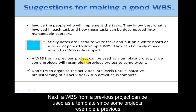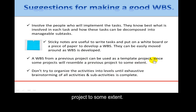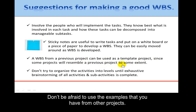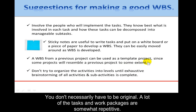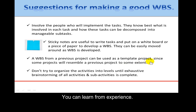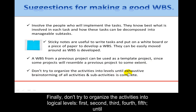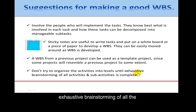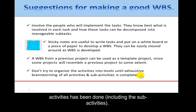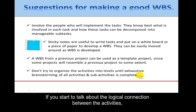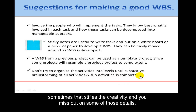A WBS from a previous project can be used as a template, since some projects resemble a previous project to some extent. Don't be afraid to use examples from other projects — you don't necessarily have to be original, as many work packages are somewhat repetitive and you can learn from experience. Finally, don't try to organize activities into logical levels — second, third, fourth, fifth — until exhaustive brainstorming of all activities, including sub-activities, has been done. Starting with logical connections too early can stifle creativity and cause you to miss important details.